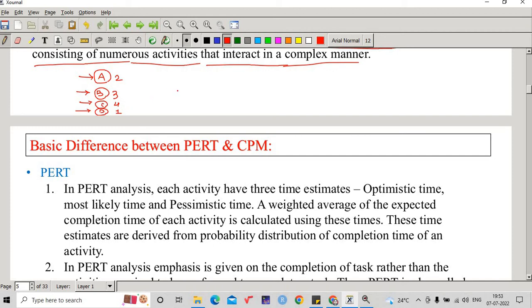That means suppose I am having a further task to be done on all of these products, then what I have to do is look after the fact that all of these products come to this particular position in the same time frame, but it will not happen. Am I right? So I have to adjust the time frame for the next activity by considering the maximum time required to complete the previous task.